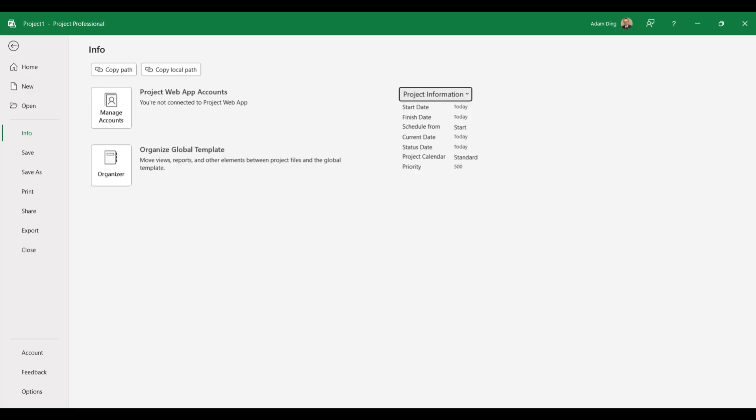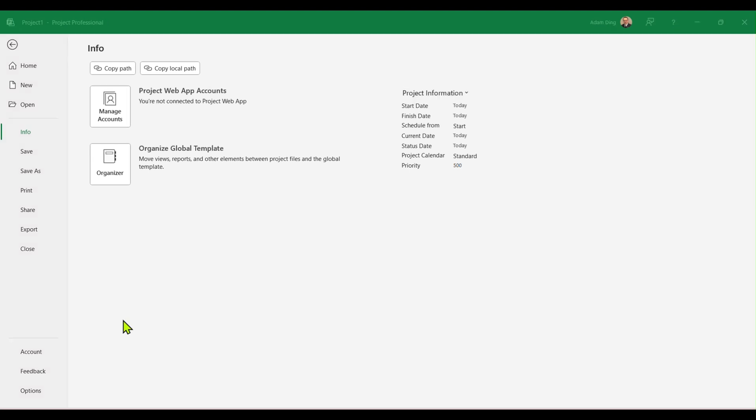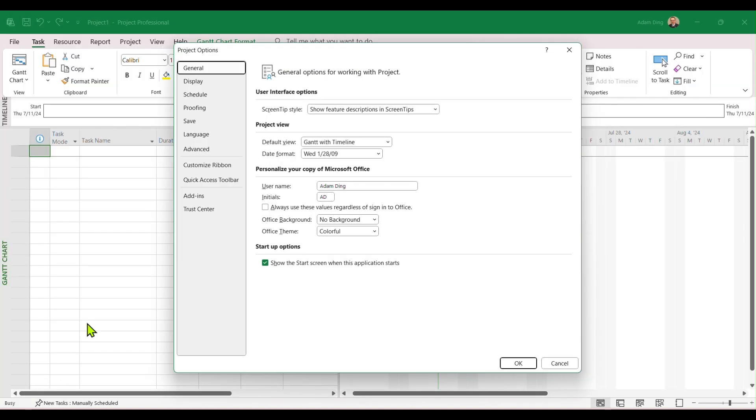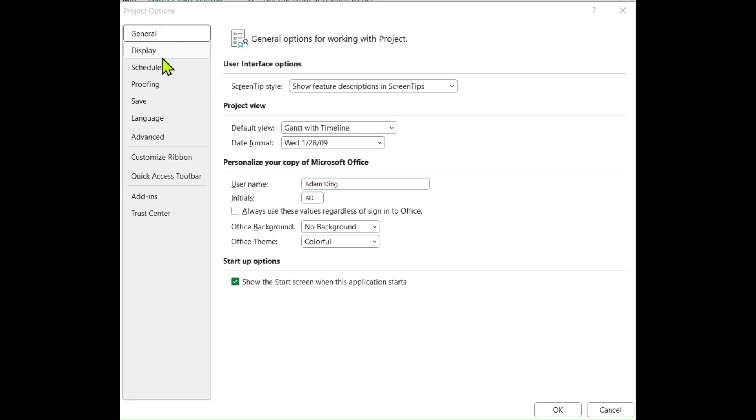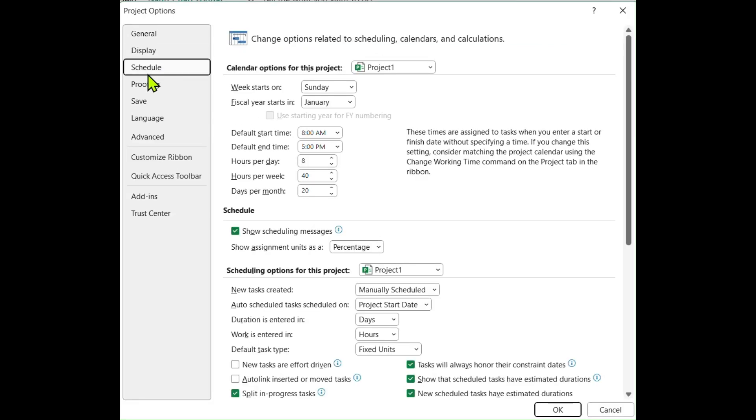By default, Microsoft Project Scheduling is set to be manual. We will need to fix it once and for all. This time, click on Options. In the next window, click on Schedule. Under Scheduling options for this project, change the option for New tasks created from Manually scheduled to Auto scheduled.